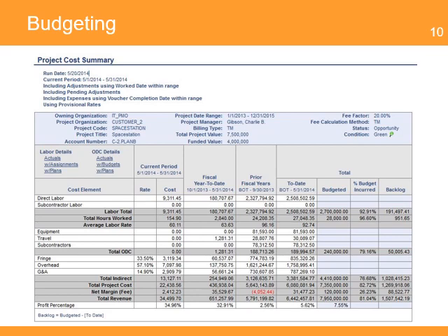One of the useful uses of having a budget in a PMIS is the ability to perform earned value analysis, which can determine if the project is using its budget as planned, compare the difference between actual versus planned costs, and estimate the total cost of the project at completion.